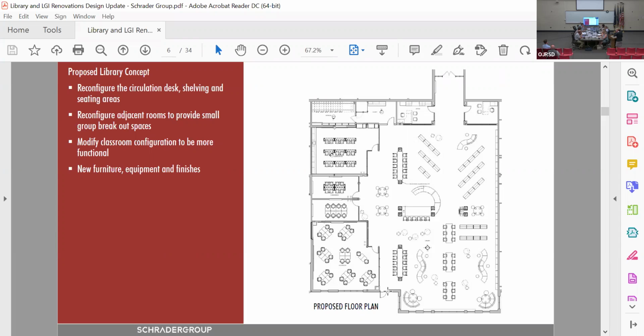I have a quick question. Just getting back to the cost of this for a second. Remind me again, what was allocated in the budget for this year to cover the cost of the project? Sure. The original budget that we allocated, not having a cost estimate professionally prepared, was $1.5 million. And that was using, since 2017, when we originally initiated the project, that has been put on hold several times, a 3% escalation clause.